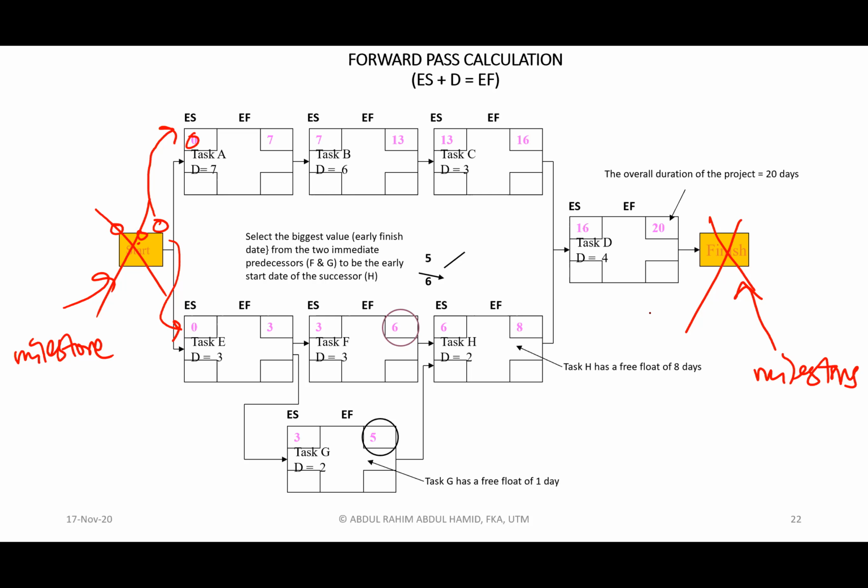But if you do have a lot of activities, it is always good to create one milestone activity such as start and then complete those things with finish, so that you can close the loop. Close the loop, meaning to say we do not want to have hanging activities.